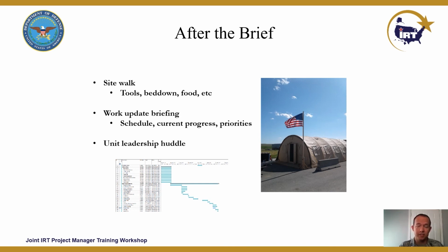You want to provide a work update brief to everyone as well that first day and let them know the current progress. Here's where we're at in the project, and here's where we're planning to be, or here's where we want to be after your rotation leaves, and here's our priorities. So you want to set that expectation up front too. Give everybody a picture in their head of where we're going.